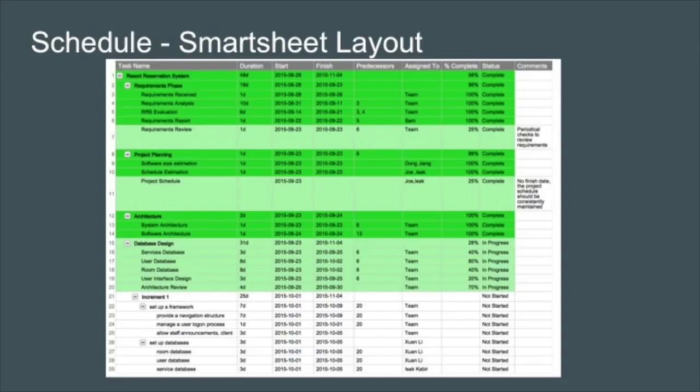This is the schedule of the project plan, which shows up to and including the first increment. The title of the project is the first level. Indented one more to the right is the second level, which is a general functionality that can be broken up into several third-level tasks. Usually the third-level tasks can be done in parallel, and they recognize all the small labor that still needs to occur.